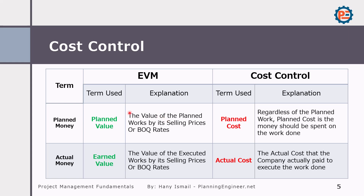What are the differences between planned value and planned cost? Planned value is the value of the planned works by its selling price or the BOQ rates — so this is the expected amount you are going to claim in your invoice. While planned cost, regardless of the planned work, is the money that should be spent on the work done or the executed work. You executed a certain scope of work and you should spend this money — this is what is called planned cost.